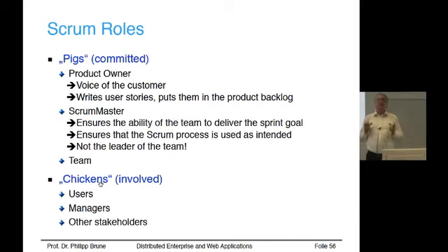And to avoid this situation, these people are not allowed to speak during the sprint. If they have some changes, they are welcome. They will be done after the sprint. So for the next sprint, goals might change. Okay.